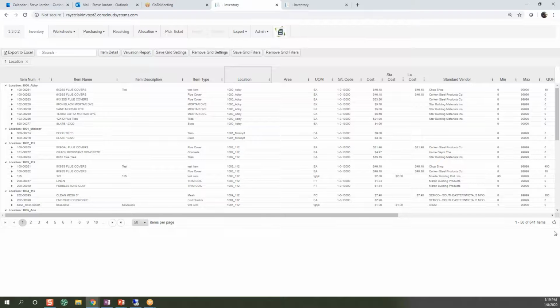So if I happen to have, say, 655 items, but on that job I'm only needing 10 or 15, then basically all I do is I move those items and reserve and set up the estimates for those jobs into that location. So now I can see, even though that item might be used on 5 or 6 other locations, I can come in and have a standard or a normalized inventory numbering schema for the material that we use on a job. Now, that could also be that I build it every time I do a location, like a buyout. So when you start looking at the solution and how that works, the location is very important.